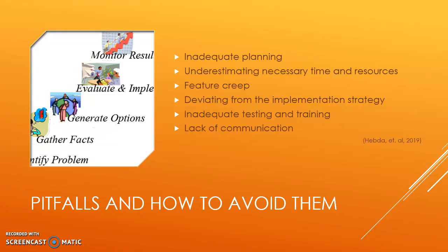Pitfalls and how to avoid them. Adequate planning is key. Making sure to account for the time and resources needed for the implementation team and project manager to devote to the development of the project and accounting for hidden costs will prevent surprise issues midstream. Implementation team members cannot be expected to maintain their current jobs and also be integral members of the project team.